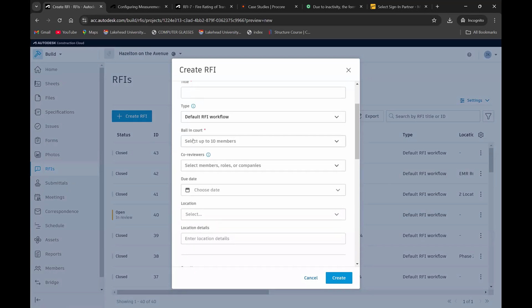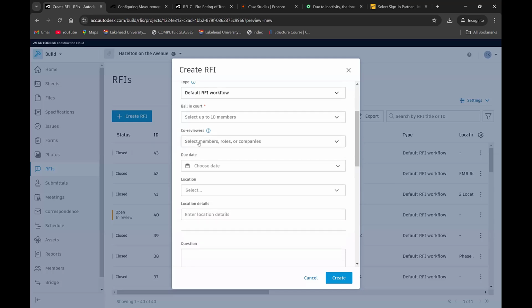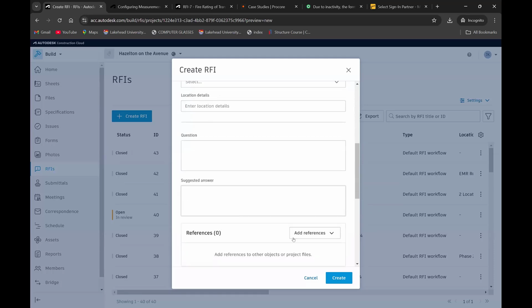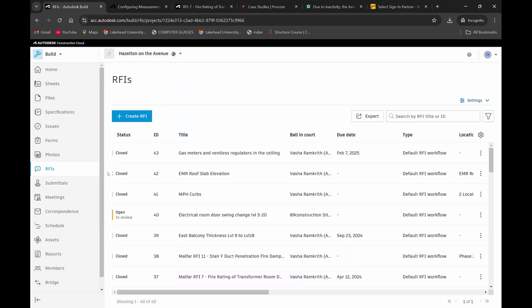The title, like let's say you have an issue in the plumbing, then you need to send it to the mechanical consultant. Ball in court means the person who needs to respond to you. Co-viewers is your team and whoever else is necessary. Type your question, and once you create this, they will look into it and send you an answer. That way you can distribute it to the site team, and the site team will start execution. It won't take much time, and it will be very easy for the site team too.